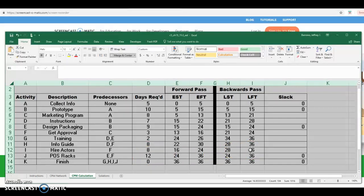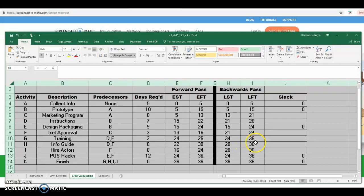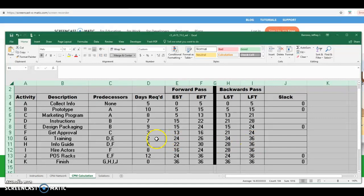Similarly, activity I is required for the finish, so it finishes on day 36, and since it has an eight-day duration it can start on day 28. Same for H and same for G — the start days are based on the duration: 36 minus 8 is 28 for I, and 36 minus 2 is 34 for G.